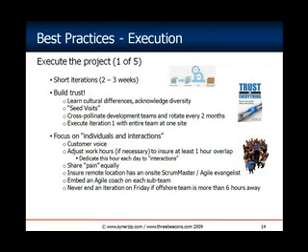As I mentioned before, you should strive to execute the entire first iteration, generally just 2 weeks, with the entire team at one site. If you do that and budget and plan for that, you'll be off and running, and more often than not, your project will be a huge success. Okay, one of the Agile Manifesto tenets is focusing on individuals and interactions. So for every decision, ask yourself, is this for adherence to process or for the benefit of people?